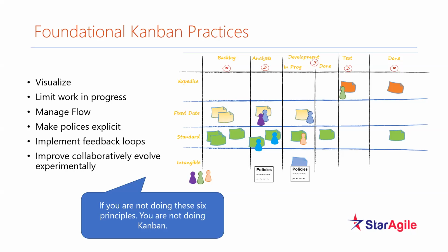So the flow is impacted by multiple things, and you should be able to analyze it when your WIP is growing at a particular place, or your tickets are not moving from left to right. What is the cause of it? Whether it is a quality issue, a technical blocker, an integration issue, multiple defects in a particular feature, changes in the requirement, people not available, or a capacity issue. We need to analyze it and continuously improve, right?